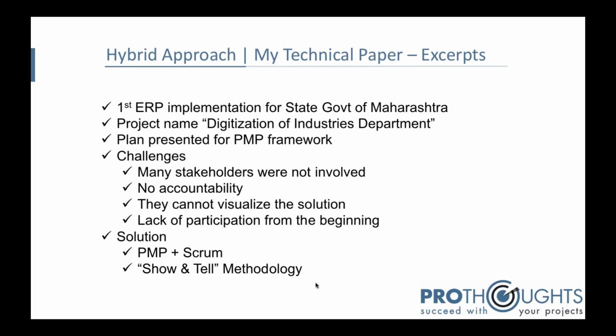We started using that for the other modules, but that didn't work for the other modules, because if they used to give me a certain requirement, it was very difficult to only customize that and show it to them, because it was very resourceful if I develop the entire module and then show, say, the 10 functionalities to them. So it didn't work in a kind of ready-made product, but it worked for website development. So we decided to use both the methodologies in the same project.